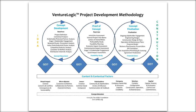A pre-feasibility study is typically a scaled, limited study to show that the project is potentially feasible. For example, if it's energy, it might look at the feedstock to see if there's enough — as in a biomass project. You can sometimes get some funding for that, but it's very limited, so you have to look at partners and groups willing to partner with you in exchange for ownership or a larger contract. Then you plan and carry out your full feasibility study.